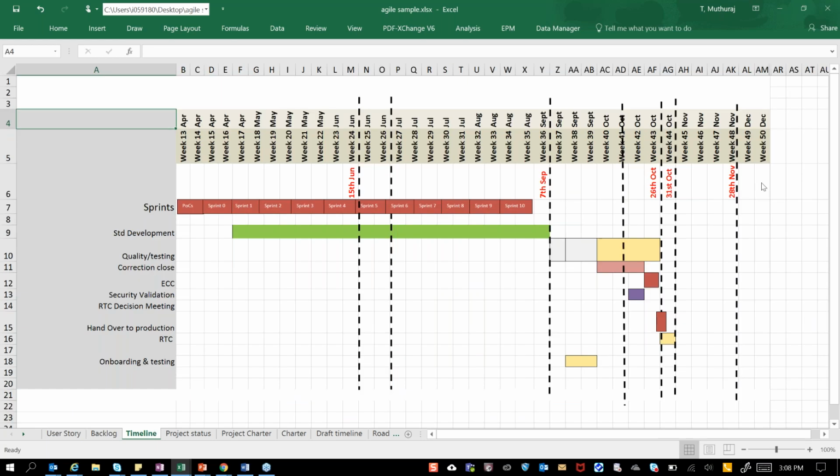And timeline. Now that we talked about the different building blocks, all these building blocks are finally taking you through the whole product development timeline till the time you launch your product, right? So this is a template, for example, that I use for managing the timeline of my products, right? The major block indicates which sprint we are in currently, and then all the weeks are entered at the top, and the different aspects of what we have to do on the left-hand side.